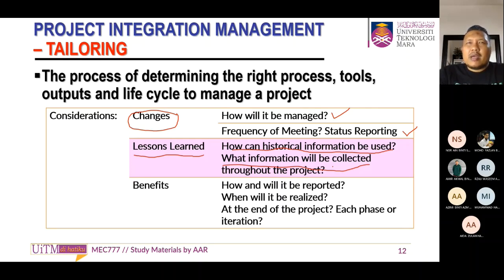They didn't make proper room data sheets. I took this project over from someone, and this person didn't prepare, or didn't instruct the contractor or consultant to prepare, the room data sheet in the proper form. So it's very difficult for me if I find that something is against the normal practice, especially on the firefighting system in mechanical.